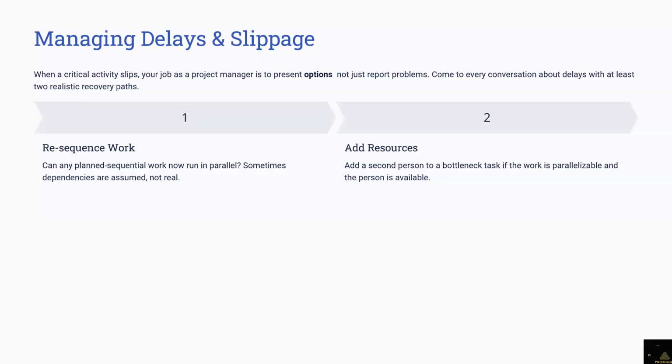That's what you'll be doing also, because it will always come up. So you put that calculation and you show the client this is the cost. Once the client agrees, there's another slide for change management that we're going to look at on that cost. Once the client agrees to the cost, there should be an email, not just verbal. Sometimes there'll be a verbal communication; if they give you that, you send an email back based on our discussion.